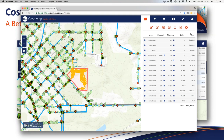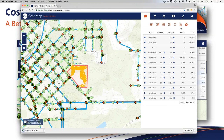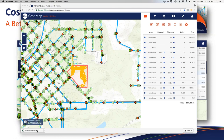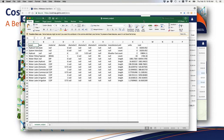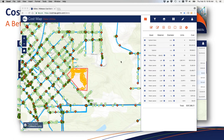The first click activates the COSTMAP toolbar. The second click activates a tool to select an area — using existing project areas like capital improvement areas constructed within GIS. Selecting that area goes out and selects all assets that intersect that polygon, mirrors them up with the RSMeans data API, and quickly gives me a list of each asset with their estimated construction costs and a running total at the bottom. One more click exports this out as a spreadsheet — with all assets broken down by material type and estimated construction cost. We've done the line-by-line work for you behind the scenes.